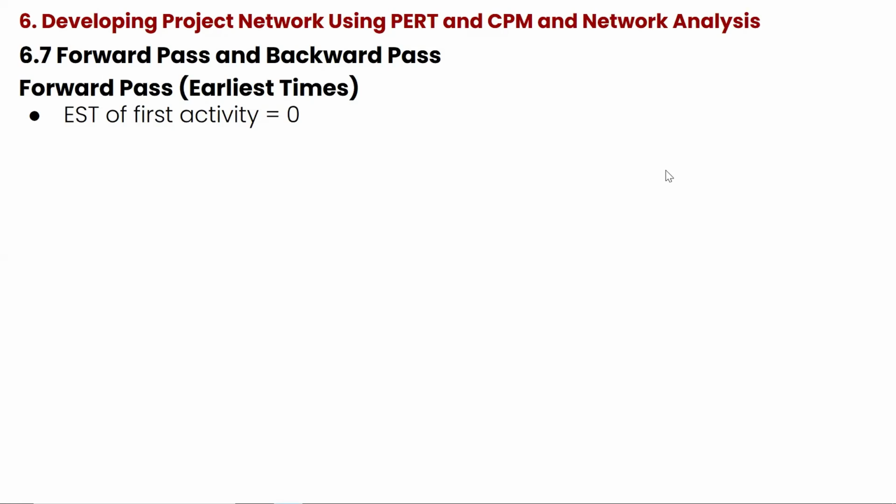Let me hide this. Okay, we have the earliest finishing time, the EFT. That means the earliest time it will take for the activity to finish. It is the earliest starting time plus the duration. Now, when we start to talk about EST, EFT, LST, LFT, these are areas I have seen that students may have some challenge with.